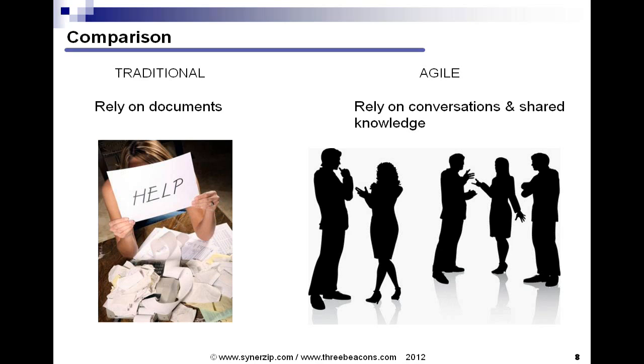Well, we felt like it would be good to document the reskin procedure describing how to modify the baseline app for another hospital. That way we could hand this activity off to a new hire or someone of a lesser salary or hourly rate, and would allow for keeping a record of that procedure. So that's a good example of a minimal documentation approach.